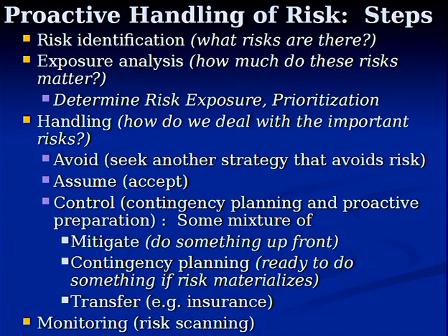And then finally, and this is very important, risk scanning. Constantly looking out for risks that may materialize. I want all of this to be going on in your teams through the semester. Keeping an eye out for things which may be developing. You haven't seen this guy for a while in your team. This one is talking about being overloaded, and he's thinking about dropping the course. These things happen. And the sooner you can spot it ahead of time, identify it, bring it to the surface, discuss it, and figure out a mitigation strategy or contingency plan, preferably one of those two, the more you're going to be able to deal with this. So you're not whacked on the side of the head.